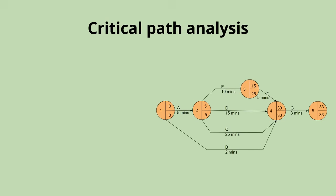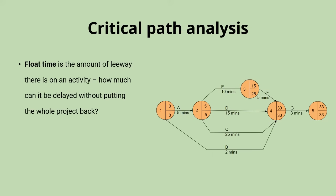The proper term for this wriggle room is float time — the amount of leeway an activity has, meaning how much it can be delayed without putting the whole project back. We calculate total float for each activity by taking the latest finish time of that activity, subtracting the activity duration, and further subtracting the earliest start time. For example, activity F (frying eggs) has an LFT of 30 minutes, minus duration of five minutes, minus EST of 15 minutes — giving a total float of 10 minutes.